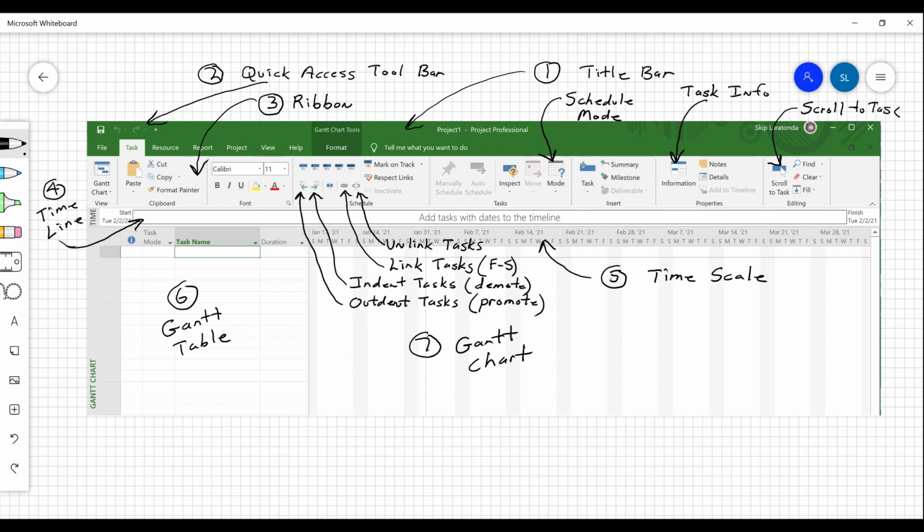That's the first thing I'm going to point out to you, is that when you launch Microsoft Project, make sure you start it in the automatic mode. Before you even start typing tasks, before you put in any durations, because it's not retroactive, what you need to do is you need to make sure that the mode is auto-scheduled. If you don't do that, you take all the dynamic features out of the product. And a lot of people don't know to do that. Once you get more and more experienced, then maybe you want to look at the manual mode. But until you get familiar with Project and you understand how it works, you should make sure that mode is in automatic.